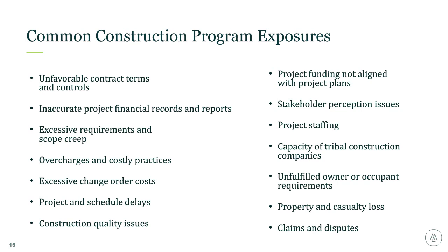We recently had a project where our client had significant overruns during the design pre-construction phase of their project. Long story short, the design plans kept getting changed by senior management, and the project management team, who were consultants, the architect, and the pre-construction managers were going along for the ride. They never discussed cost impact or schedule impact as these decisions were being made. This was an easily avoidable practice, by having a good design plan that requires appropriate approvals for any owner-initiated changes with cost and schedule impact considerations. This issue, which cost millions of dollars, could have been avoided or significantly reduced.